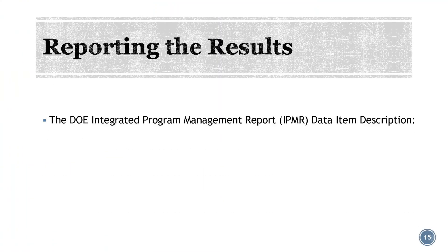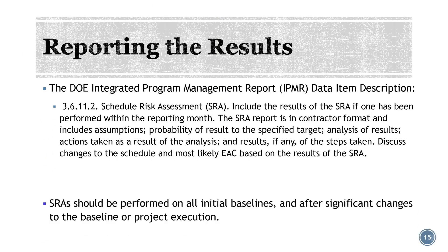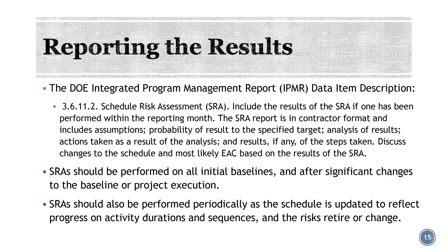Finally, the results of all SRAs are to be reported in the Contractors' Integrated Program Management Report, or IPMR. This reporting includes not only the results of the analysis, but the actions taken based on those results. The SRA process is a valuable management tool which greatly increases the usefulness of the project schedule. They should be performed on all initial baselines and after any significant change to the baseline. In addition, regardless of baseline changes, it is a best practice to periodically perform the analysis as the schedule is updated with performance.